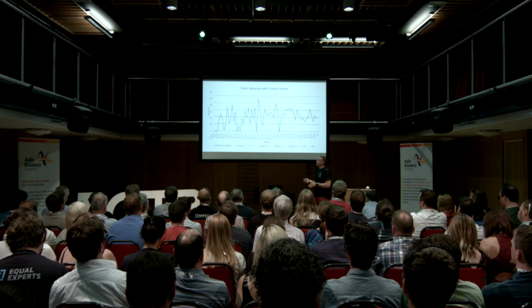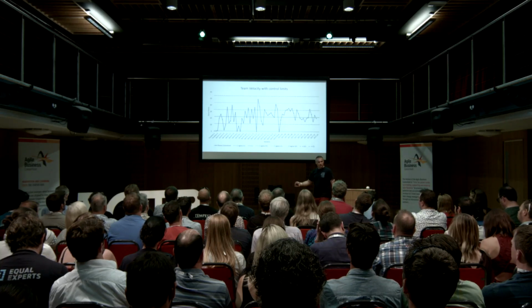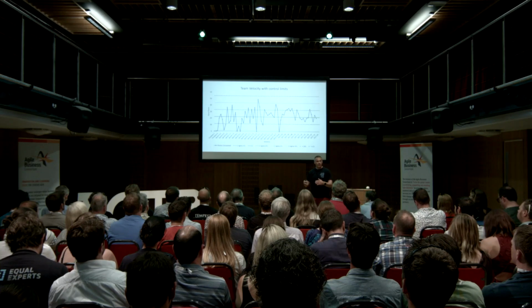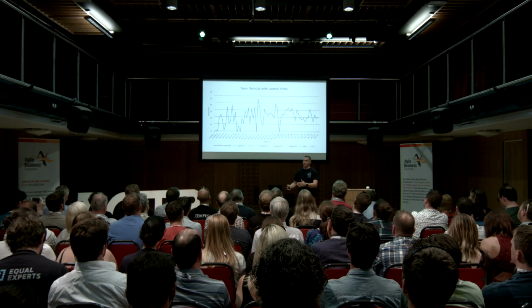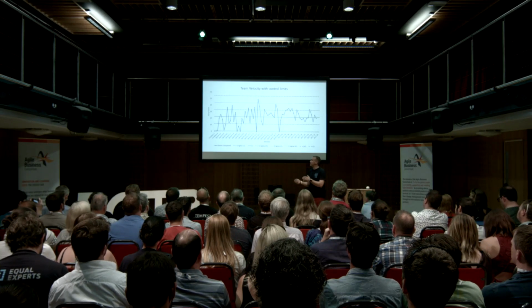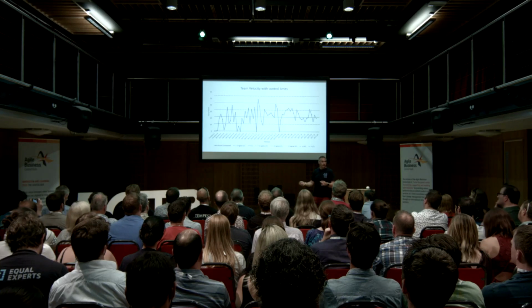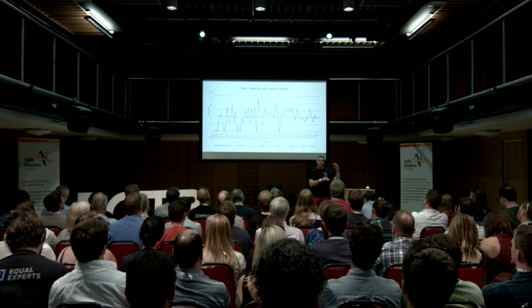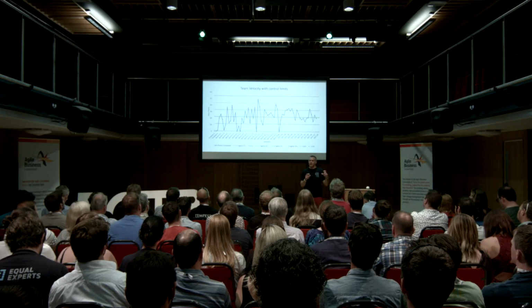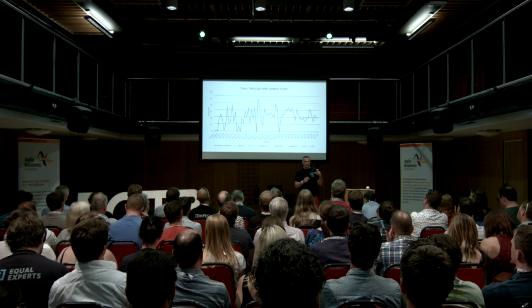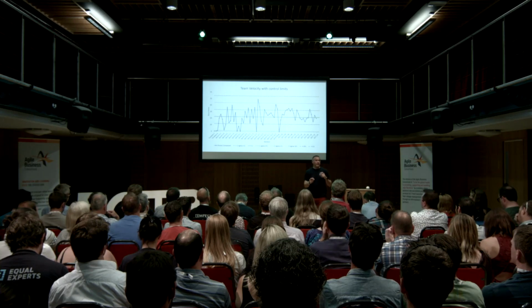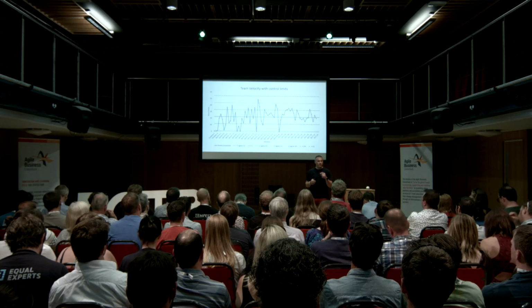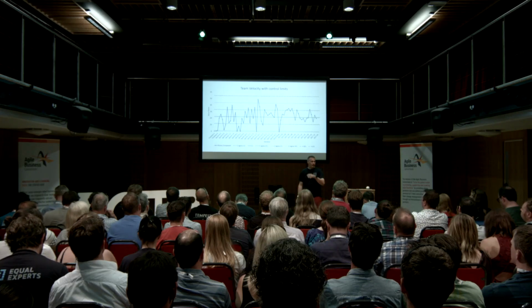Because we know something about the velocity process, we know it's impossible to have a negative velocity in any given data point. So we can fix our lower confidence limit to 0. And by doing that asymmetric confidence limit analysis, there's some slightly different checks that get performed on the data set to highlight these outliers.